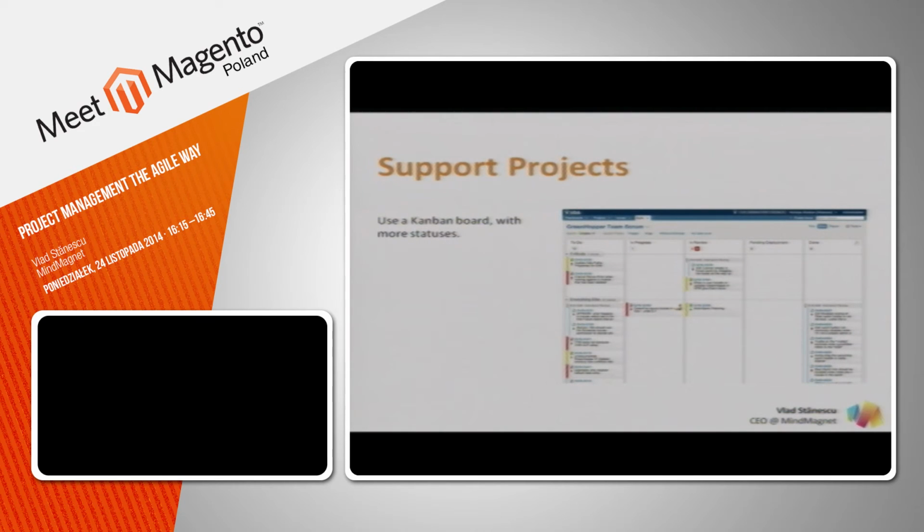On support projects, we use the Kanban board with more statuses. So for example, we go for to-do, which is a new task that's coming from the client. Then the developer pulls a new task into in progress. Then he moves it into in review. And then perhaps if the client likes to make deployments at a certain time, it moves into pending deployment and finally to done when it's deployed to live and it's gone. After that point, the task is considered completed and then anything else related to the task is actually a new task.